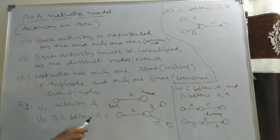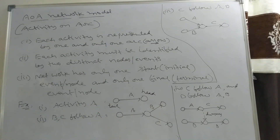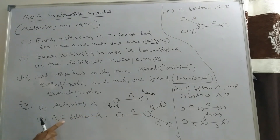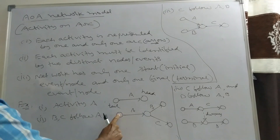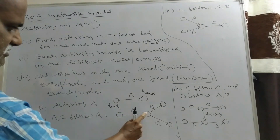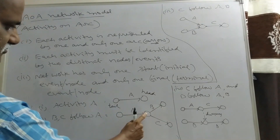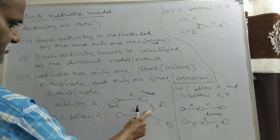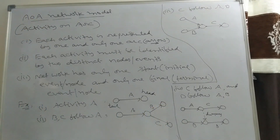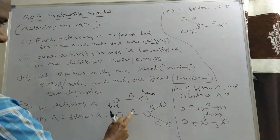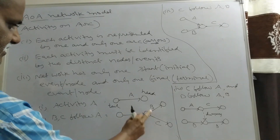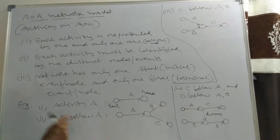Second example: B and C follow A, meaning after completion of A, both B and C start. A is a predecessor to B and C. To draw this, first draw A; the head event represents completion of A. From that node, B starts and C starts.